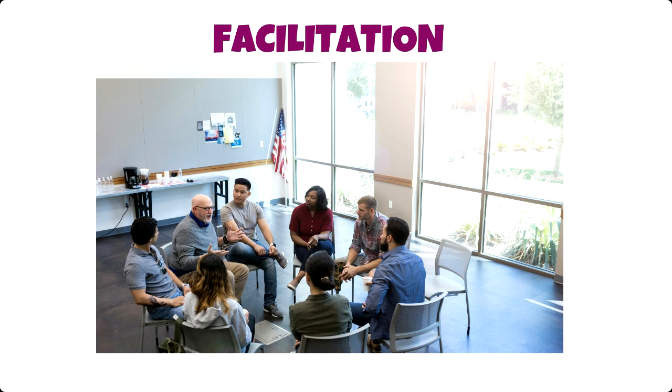Another way to do it is to create spaces where we just pause, just create silence in the retrospective. Because creating silence for a couple of minutes allows people who are processing information and still thinking about something just to catch up with whatever's being said, so that they also have time to process. The thinkers will keep thinking. So Nancy Kline has a whole lot of cool ways of doing this in her thinking environment work, in the book A Time to Think.